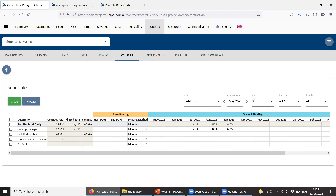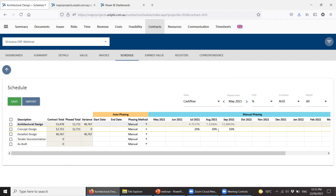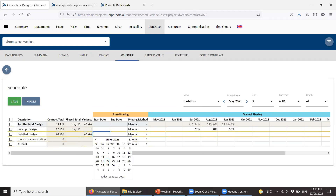In cash flow, one common option is percentage-based phasing. Concept Design is already phased — its total is $12,000 with 20%, 30%, and 50% phasing. I've finished my estimate: it's a $53,000 job. I'm putting in here the profile of how I'm going to milestone claim. In the contract I may have negotiated 20% on start in July, 30% on draft in August, 50% at completion in September. I just type 20, 30, 50, hit Save, and it works out the cash flow profile.